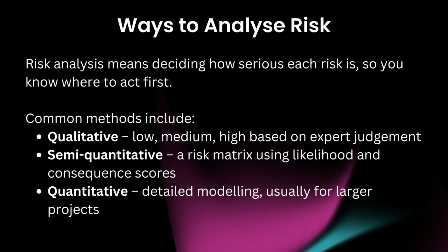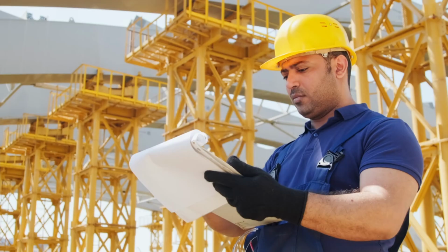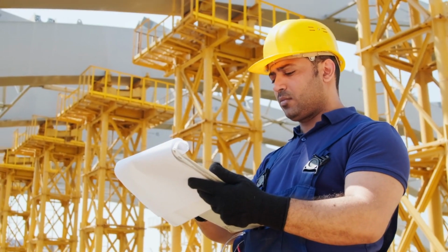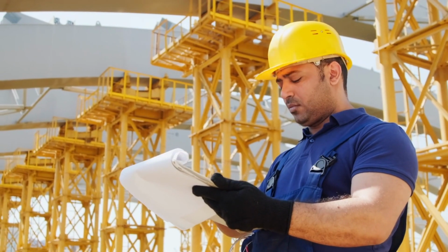Ways to analyse risk. Risk analysis means deciding how serious each risk is, so you know where to act first. Common methods include qualitative, low, medium, high based on expert judgment; semi-quantitative, a risk matrix using likelihood and consequence scores; and quantitative, detailed modelling, usually for larger projects. Most building businesses use semi-quantitative methods because they are practical and consistent.